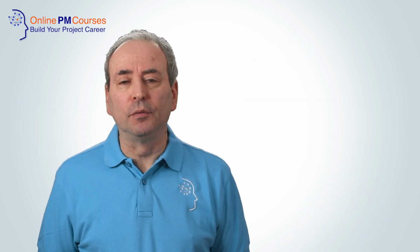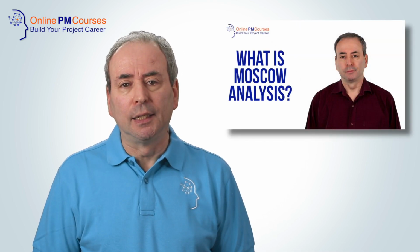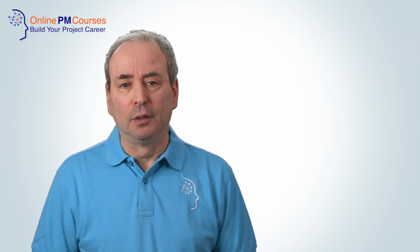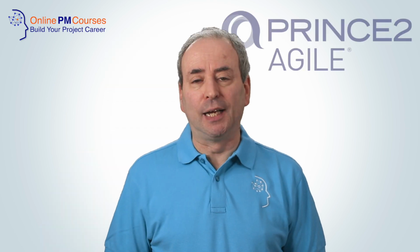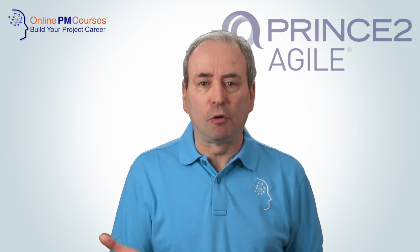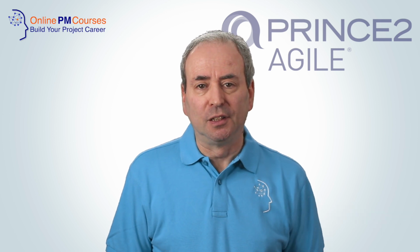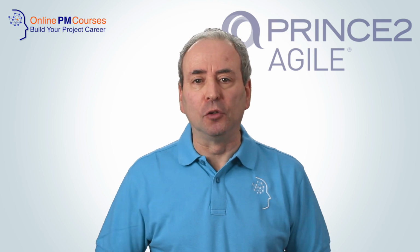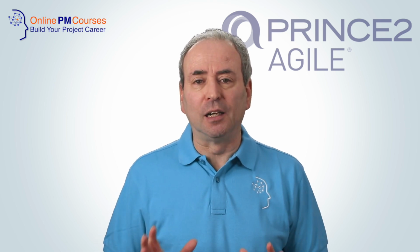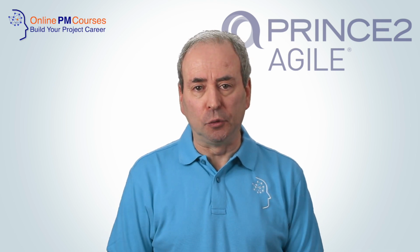And to achieve all of this ongoing prioritization, PRINCE2 Agile recommends tools like MoSCoW analysis and the use of a backlog, just as we do in many agile methodologies. So PRINCE2 Agile is designed to be a hybrid approach that takes the best of the governance and control of PRINCE2 and the adaptability and responsiveness of Agile. It allows organizations to get the best of both worlds by fitting agile cycles within a framework of a highly controlled PRINCE2 project.